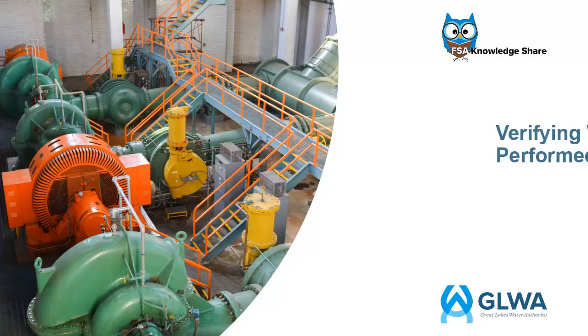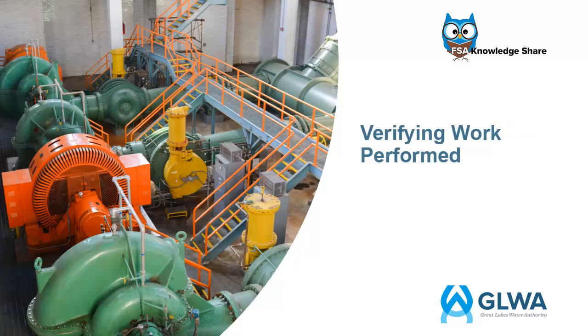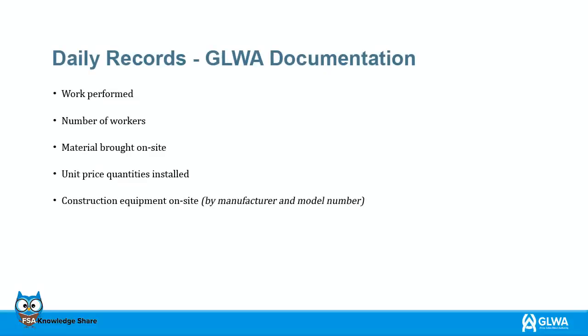To document the work performed, the project manager, or the project representative, is responsible for initiating the CCD, verifying work, and gathering the documentation necessary to support approval of the CCD. In addition to the contractor keeping their daily records, the GLWA site representative should maintain the following records.